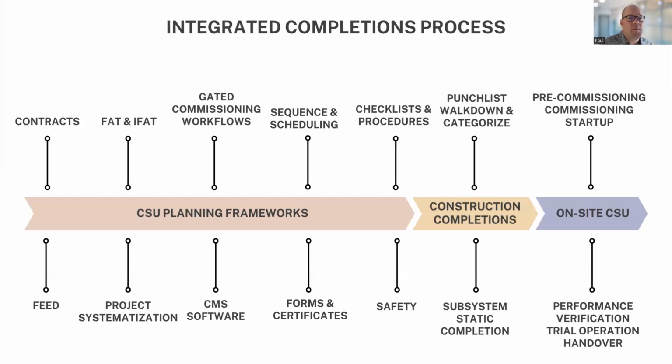Some of this complex equipment, the software is so integral to their function that without the software, they're useless. So we can't be only integrating software and hardware for the first time on site, because that's the time we're supposed to be commissioning, not debugging and programming the code. I'll send a case study after this presentation on 2 projects. One took a different approach to IFAT, and you'll see how that turned out. So watch your email for that case study to see how IFAT is properly planned for on projects.